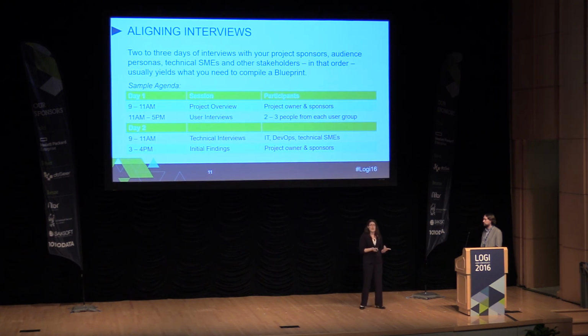Namely, we kick it off with a discussion with the project sponsors on the problem that we're coming in to solve, and any constraints and key goals around that. Next are the user interviews. We do this first because you want that information when you go into your technical discussions. Here are the systems we learned about. Here are the workflows that aren't working. Can you tell me where these things live and how they connect? And then your technical interviews where you go through those discussions. And finally, we usually present our initial findings at the end of the second or third day, and then take that information and boil it down into a document deliverable.